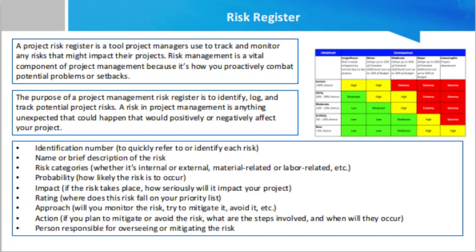Risk management is about identifying potential problems early so you can decide how to handle them. It also empowers you to track risk over time to see if and how they are changing. When a risk is first identified, you might consider it so unlikely that you don't bother doing anything about it. But what if, as the project progresses, the risk becomes a lot more likely to occur? By tracking your risk, you can notice changes like this early enough to take action.